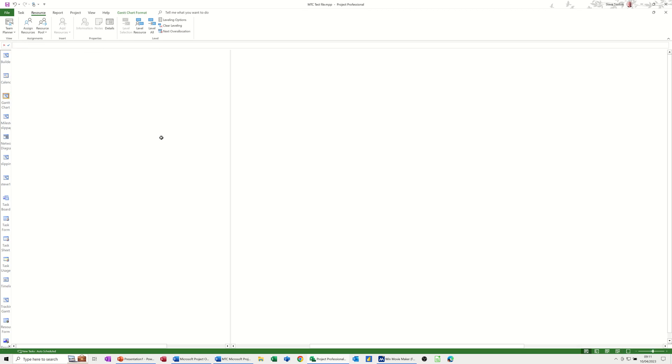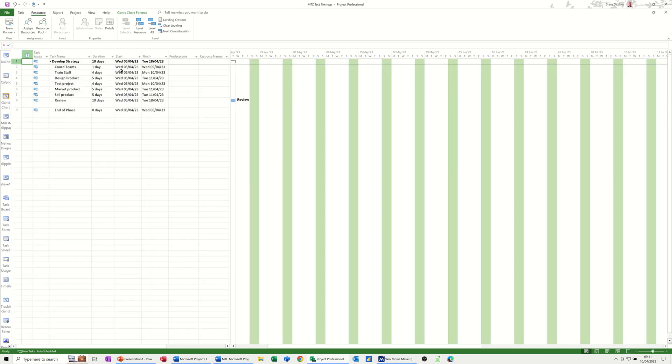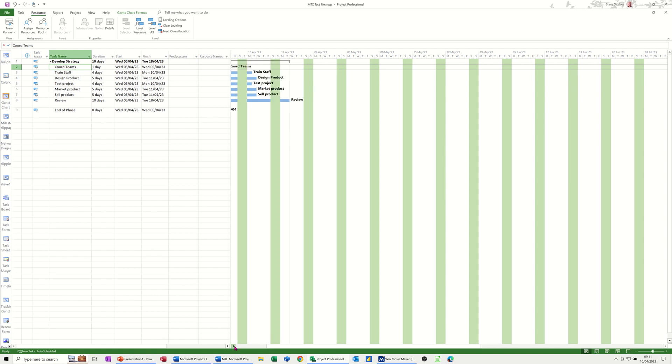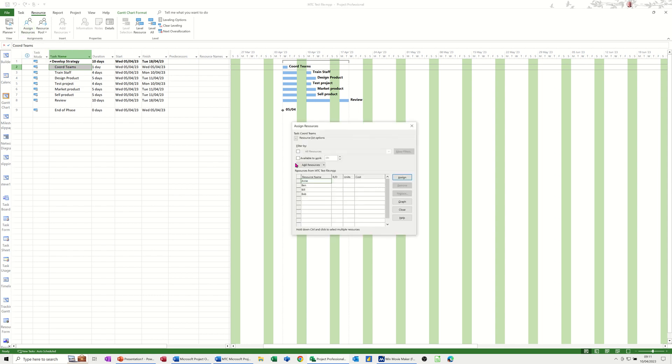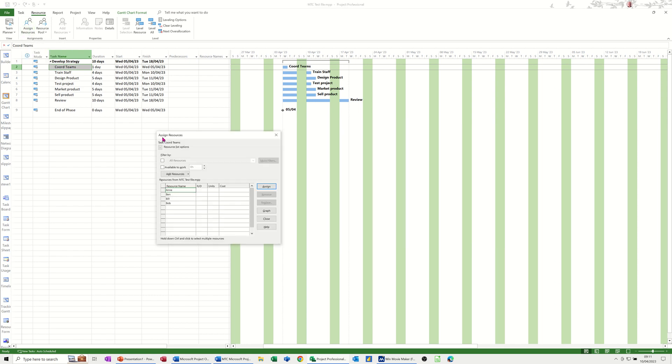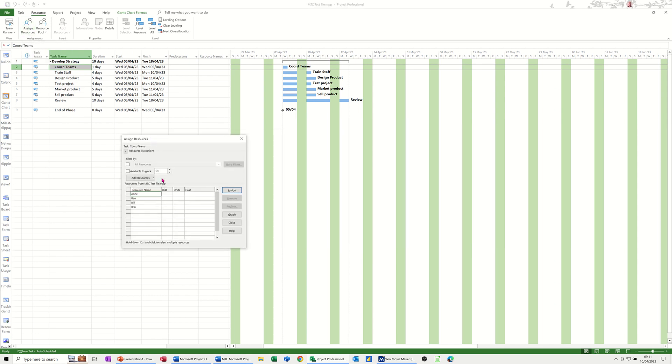Now if I come back to the Gantt chart and click on the first task called Teams, let's say I want to allocate a person to this task which is just a one-day task. If I go to assign resources, at the moment all the available resources are there. We've got 'available to work' here - if I tick that and push this up to eight hours, they're all still available.